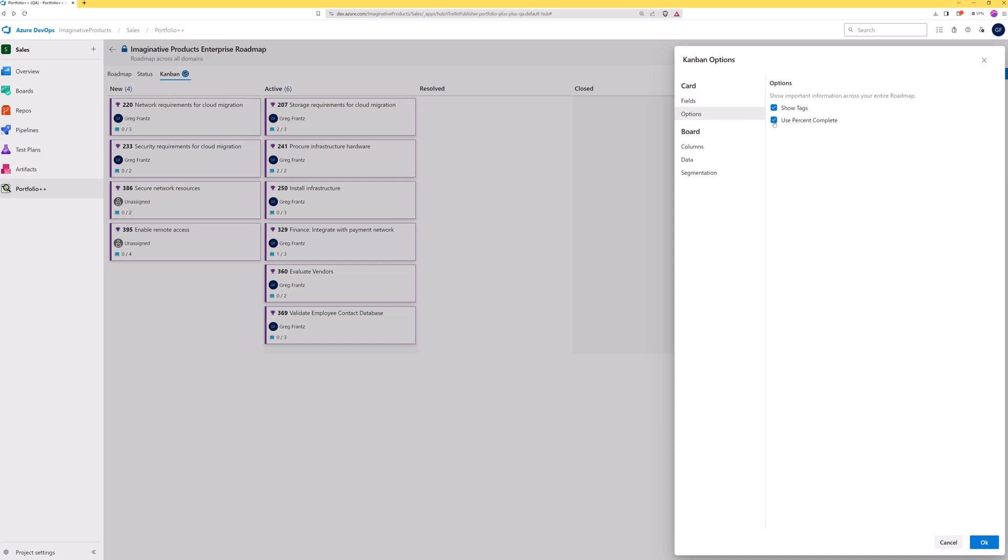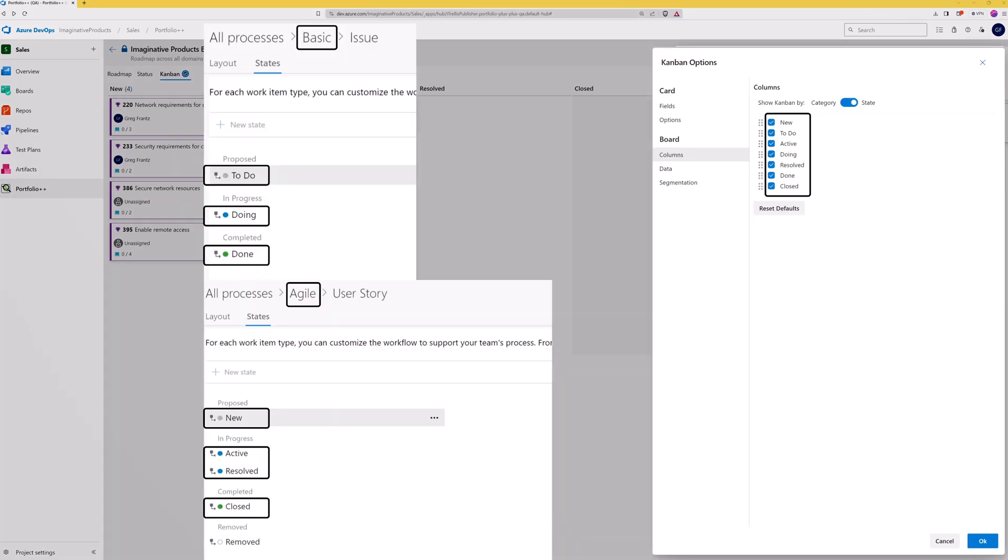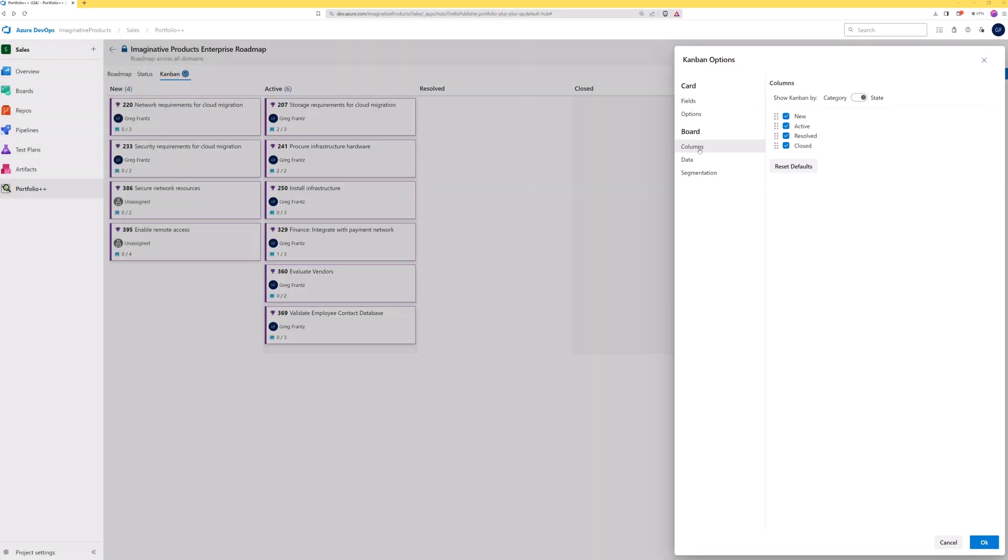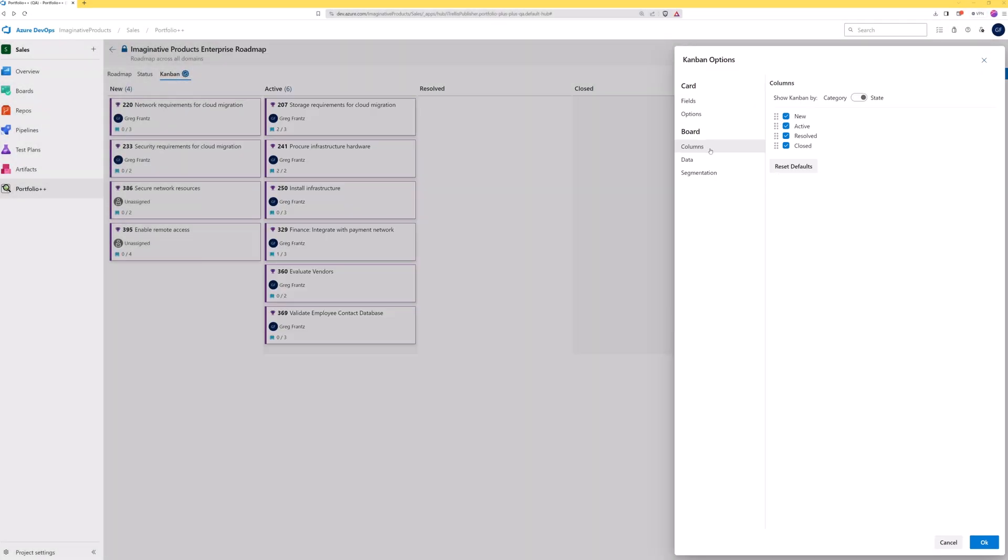These selections will also affect the roadmap view. Additionally, there are three ways to customize the board display. The columns present on the Kanban can refer to either the state or the state category. If your roadmap uses projects with more than one process template, the columns displayed will be a combination of all values from all work item types across all process templates. If your multi-project roadmap results in an unmanageable number of column states, these can be consolidated into their respective state categories.